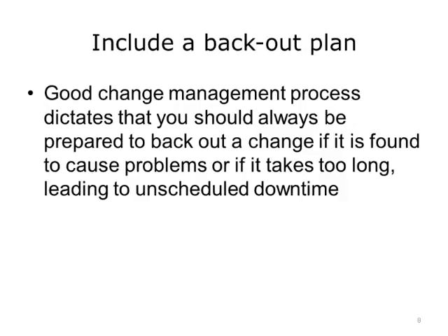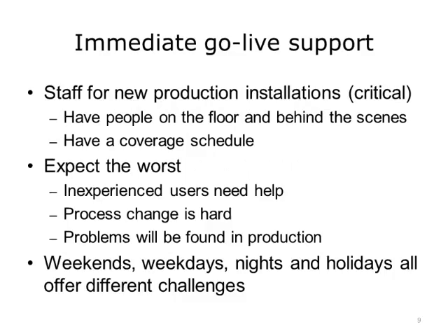Good change management process dictates that you should always be prepared to back out of a change if it is found to cause problems or if it takes too long, leading to unscheduled downtime. The time right after go live is a time for extra vigilance in support. Expect the worst as inexperienced users need help. Process change is hard for users, and problems not detected during the testing phase will be found in production. Make sure to staff appropriately with people on the floor and behind the scenes.